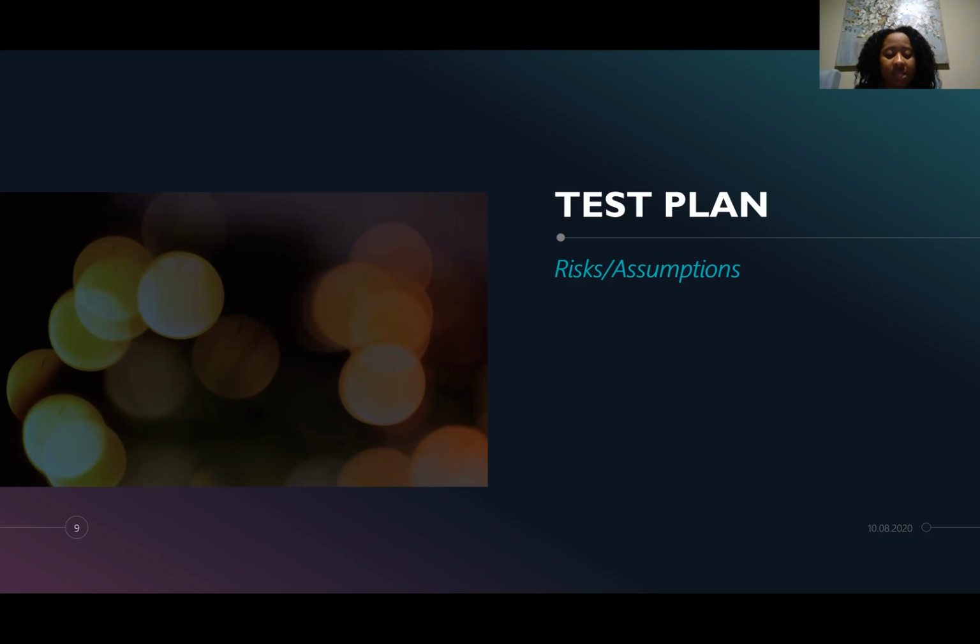Risks will include the schedule, resources, defects, and the scope. In regards to the schedule, the testing schedule might be tight. The start of the testing is delayed due to design tasks. The test cannot be extended beyond the unit testing. For resources, there are not enough resources, or resources onboarding is too late. For defects, defects are found at a late stage of the test cycle, or defects being discovered late are most likely due to unclear specifications and are time-consuming to resolve.